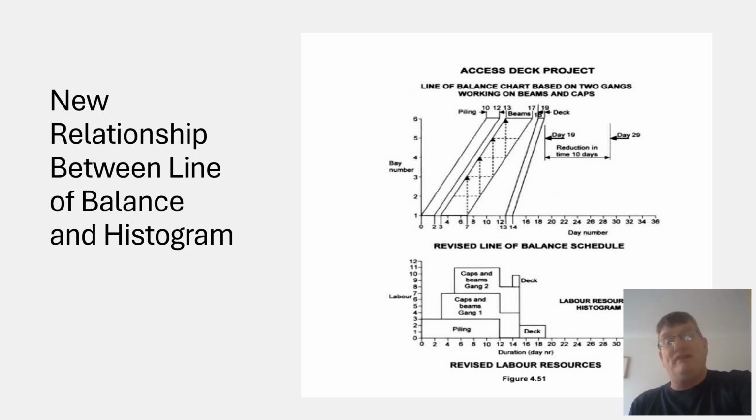It's at the top. The buffers now are just 1 day for operation 1 and 2, or A and B if you like, and then 2 days. The buffer at the top is for 2 days between the pile caps and the decking, the beams and the decking. So you can see they're still slightly out of sync, but they're much closer together. The buffer is 1 day for one, and 2 days for the other.